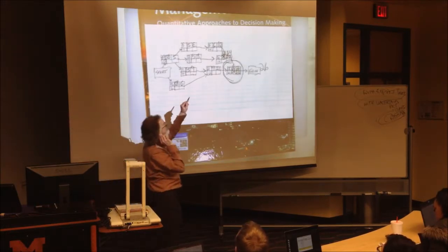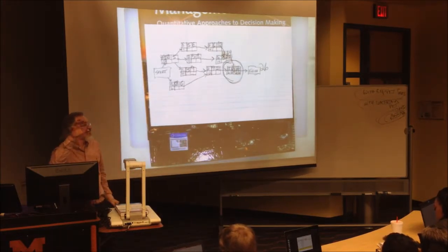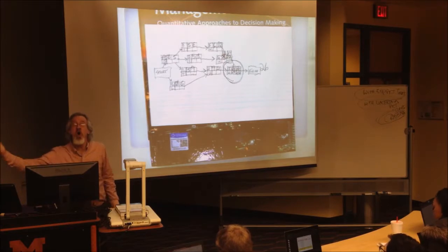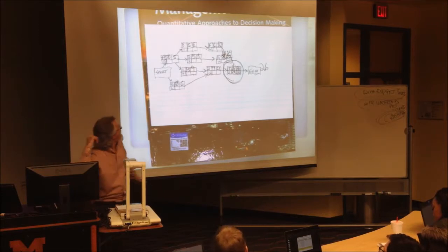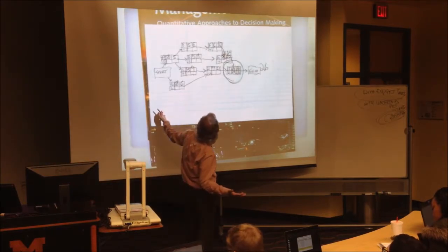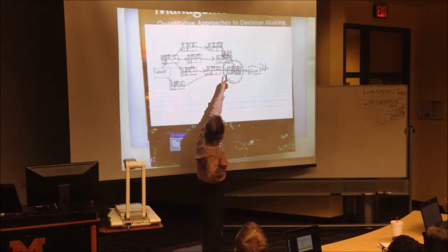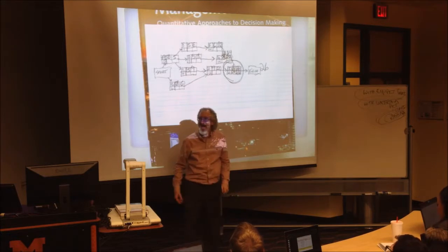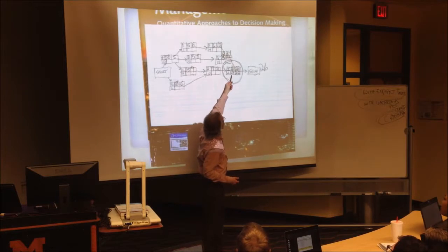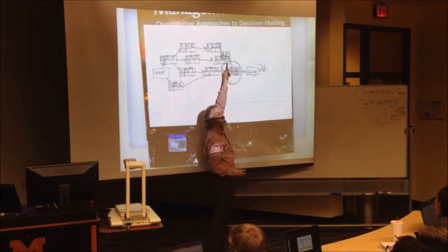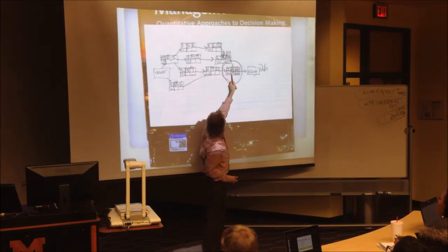Let's go backwards now. We have 2 activities going backwards coming out of G. The right-hand side, the latest finish, can be the smallest of the latest starts of the activities after it. So with G, is there only one activity after it? We're not at a tie? Okay, 24 is the latest start, so the latest finish for this one is 24. Is this the only activity after it, right? Everybody see the same thing I'm seeing? Yeah, so that would be 24.